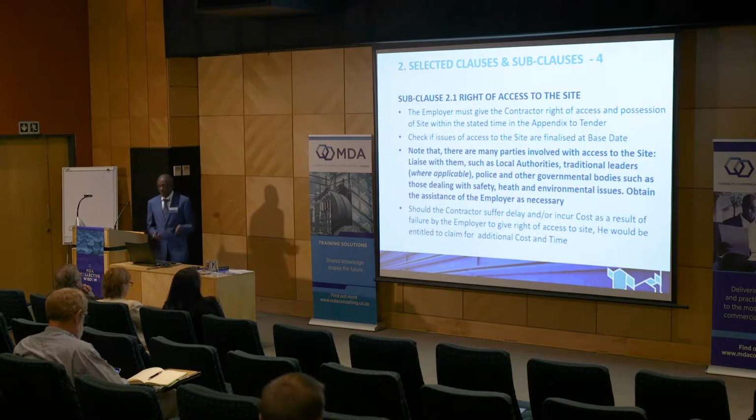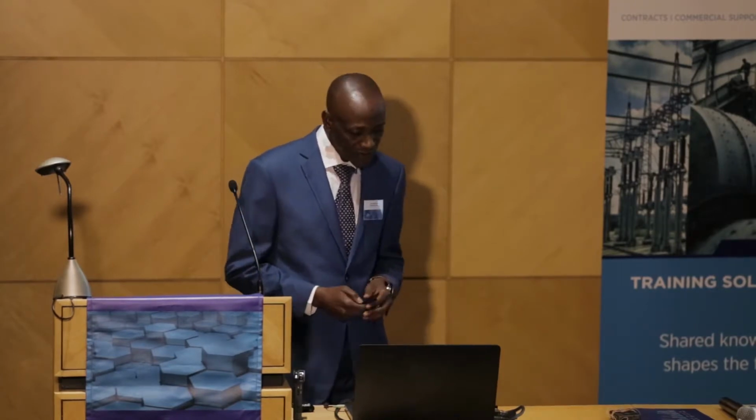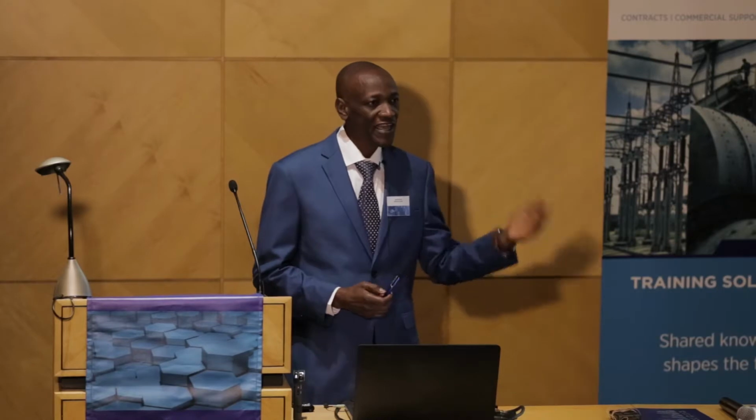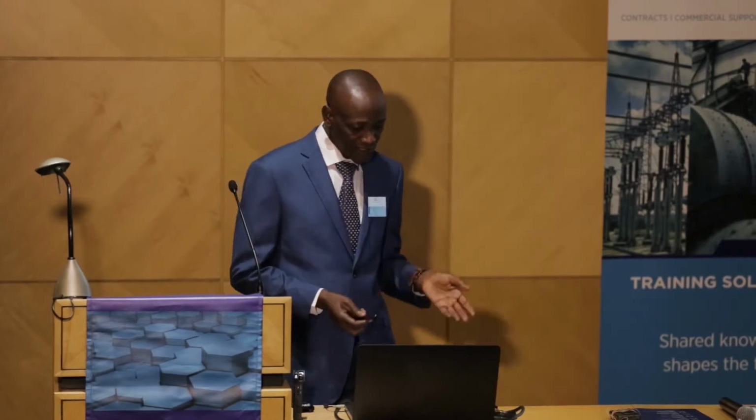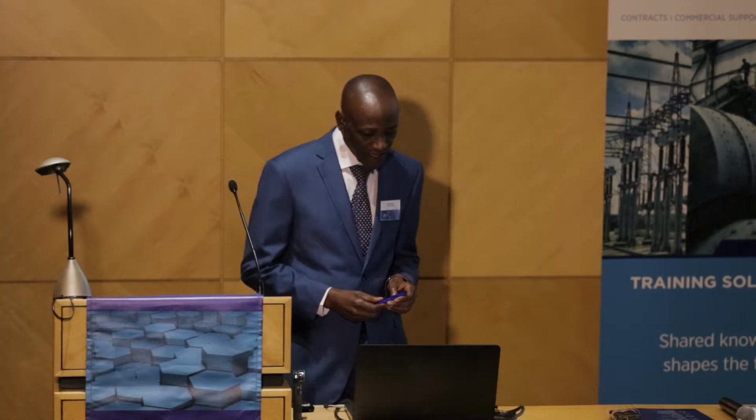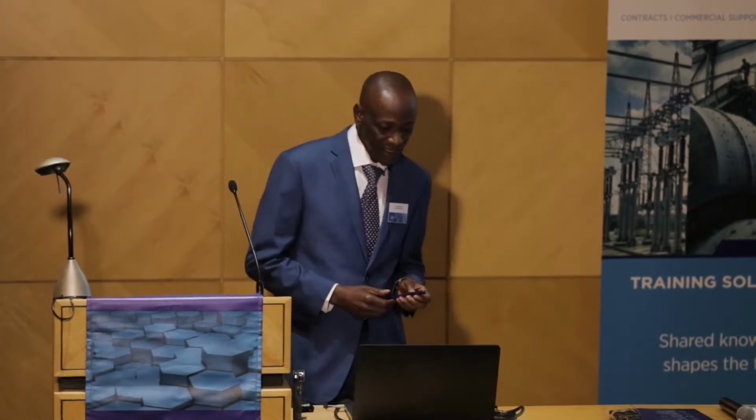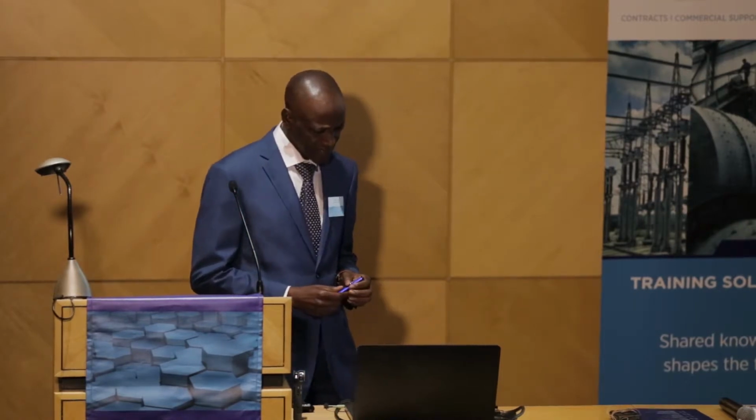Why? Because if there are some issues which are not resolved, you should understand that there are many parties involved. For example, there are local authorities. In other parts of Africa, there are some traditional rulers who also need to be consulted before you can access the site, as well as police and other government bodies, such as those dealing with safety, health, and the like.